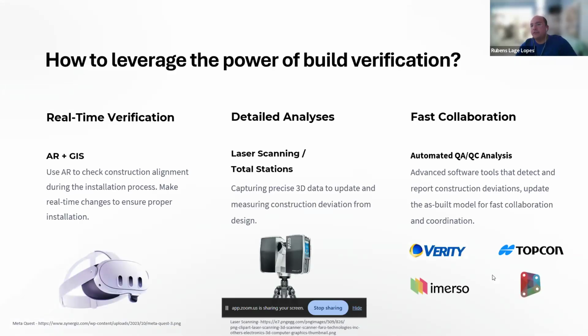And we need software to analyze this data because point clouds are massive, huge. You don't want to just link your point cloud in Revit, create sections and start to look at whether that is off position or not. You can do that if it's a very small project, but the best way is using software to give you a clear report, flagging columns yellow, red, green, and you have your results. In my master's degree thesis, I used Dynamo to do this analysis on point cloud.